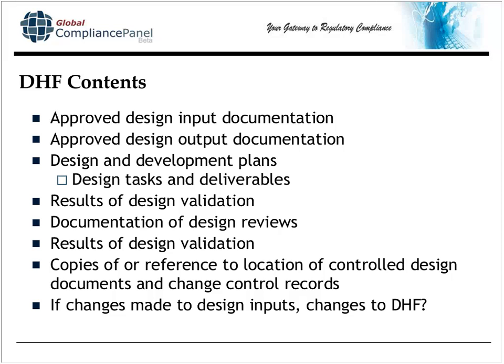Also in the DHF are the design and development plans — what you plan to do in each phase and throughout the entire process, including the deliverables. These are usually Gantt charts or Microsoft Project plans. The FDA inspector will expect to see more than one of these Gantt charts because part of showing your design and development plan is showing the plan as it iterates and changes. Showing just one plan — the last one, the one you met — is not really showing your planning process.